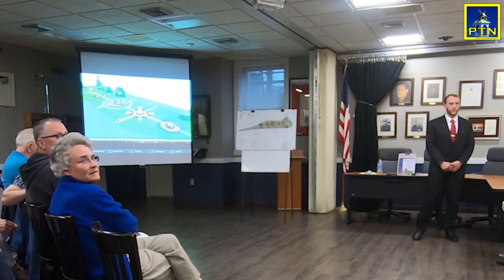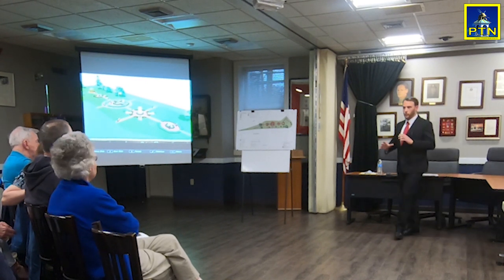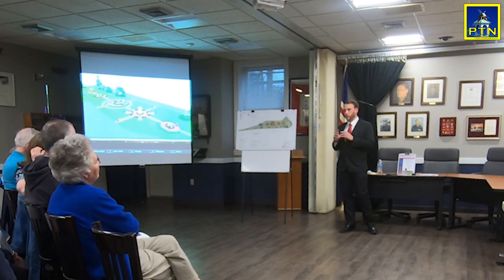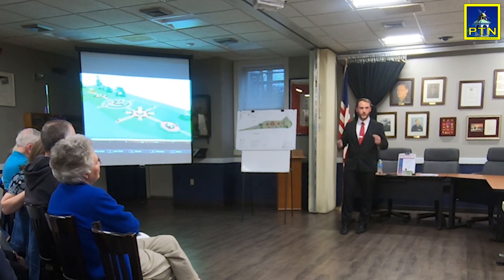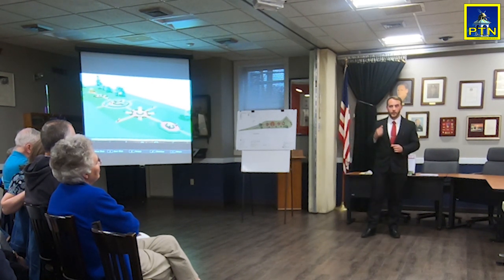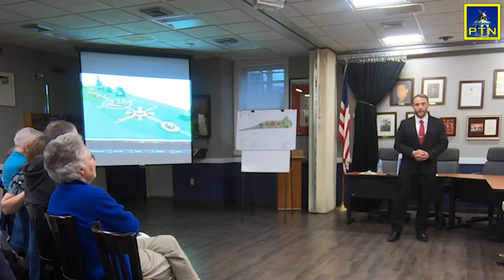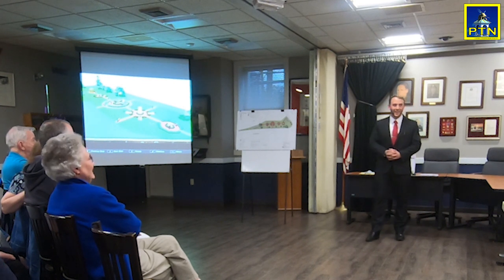Did you talk about the overall cost of this one project? So over the 10 years, how does this break down? Basically, we need another public forum. We need to coordinate with First Church, get all of the kinks out, and figure out what we want to do in phase one. I'm going to draft a scope of work, and, like he was saying, we need site plan review, and then we can do RFQs and figure out what the cost will be. If it exceeds what we have, I also write grants for the town. That's under my job description, and I'll figure out a way.